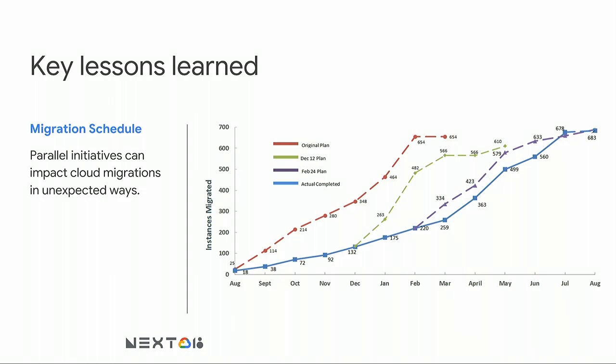Now, the interesting thing here is while we did have to replan, because we had collected all of the constraint information and some of the other business and project management information when we did the plan, we were able to replan in the course of just a few days, take that back to the business and application teams, say, does this work for you? They signed off, and then we started to execute again.